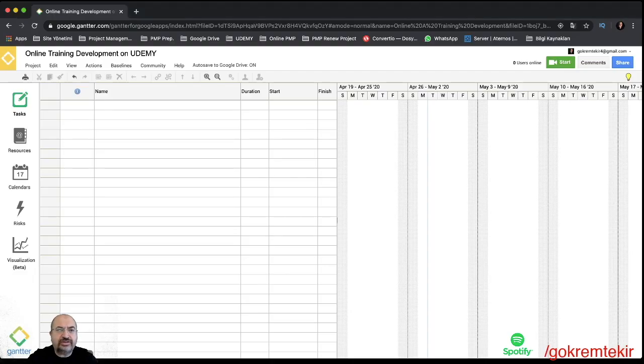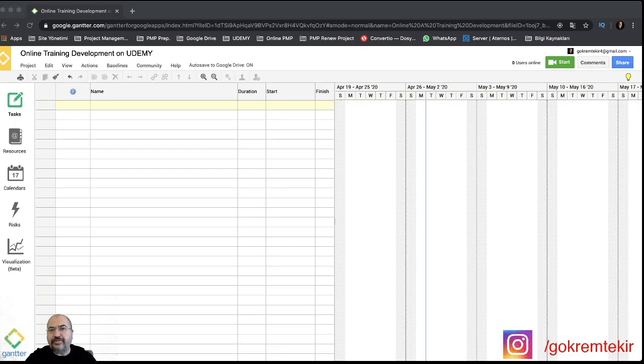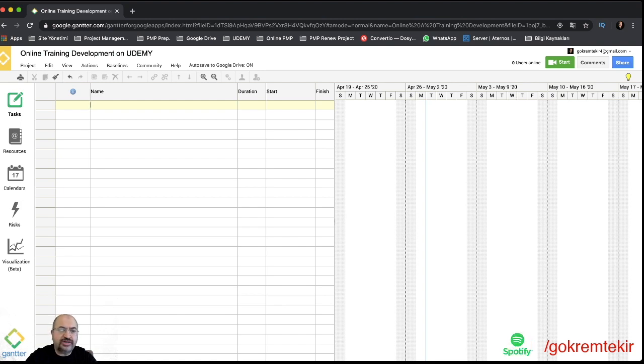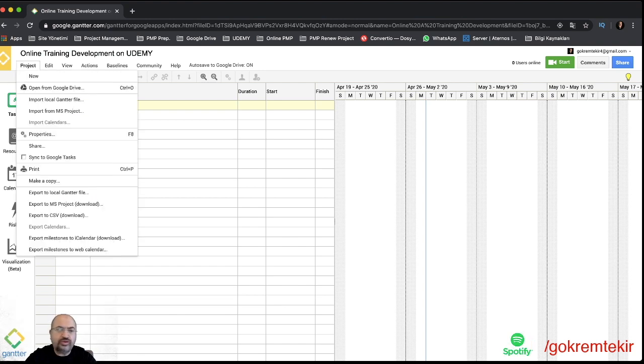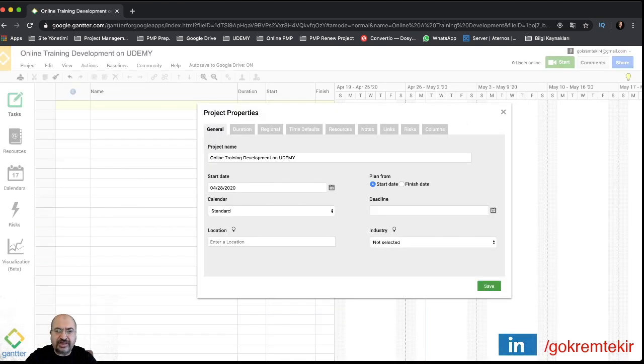As you see here, I created a project file. The name is Online Training Development on Udemy. I must decide the start date of the project. To change the start of the project, I must go to the Project menu and then Properties. In this window, there's a start date.